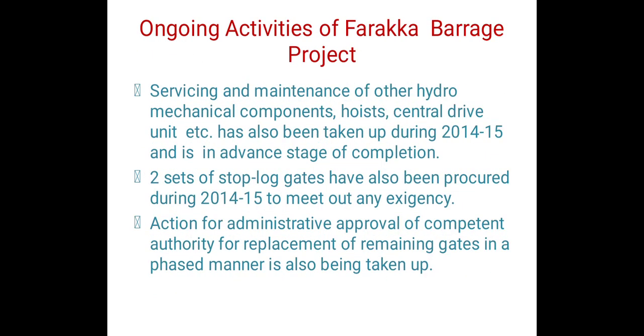Servicing and maintenance of other hydromechanical components, hoist, central drive unit has also been taken up during 14-15 and is in an advanced stage of completion. Two sets of stop log gates have also been procured during 2014-15 to meet any exigency. Action for administrative approval of competent authority for replacement of remaining gates in a phased manner is also being taken up.